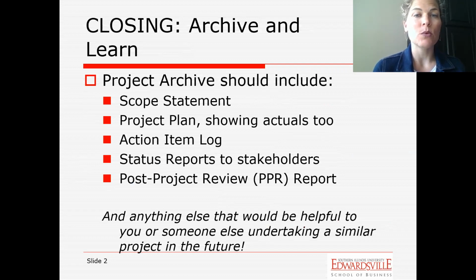Any action item logs that were created, status reports would be included in the archive. During this particular phase, you will complete this post-project review, what's called the PPR report, and we'll get to that. So once that's completed, that would be part of your archive as well. All right, and then any other documents that you think might be helpful in the future. If someone else was taking on a similar project, you might want to include those documents, those notes that you think would be of interest to those groups to help them out.